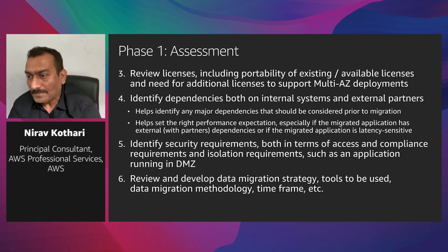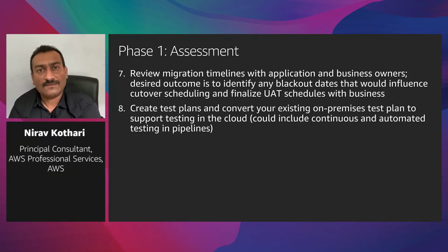You can stretch. Review migration timelines. Remember, next phase is readiness and planning. Part of planning is timeline. So review timeline from a standpoint of, is there a month-end, quarter-end processing that the application will need to do? Is there an active rollout? Is there a schedule to upgrade? Are there maintenance activities? Any one of these things happening could conflict with the timeline in which the application could be migrated, and should be identified in the assessment phase. Ensure you have a checklist item so that anybody doing the assessment captures timeline-specific information.